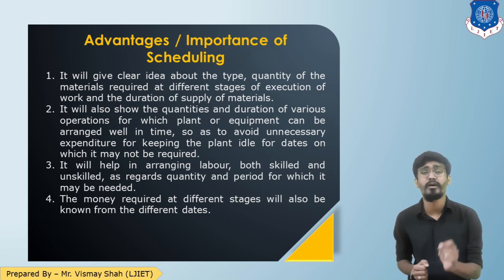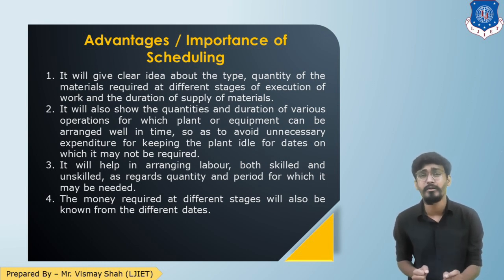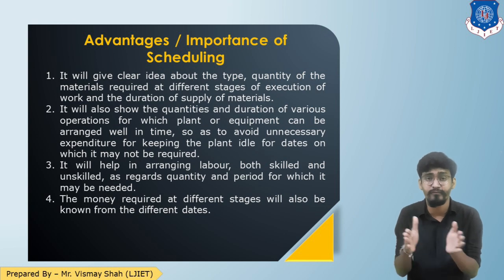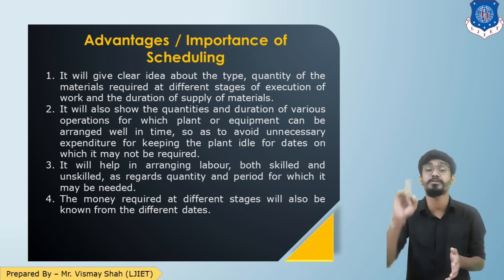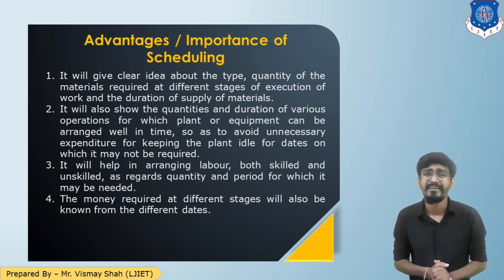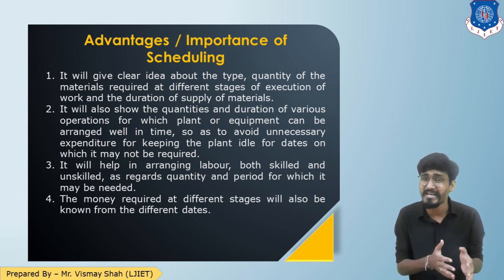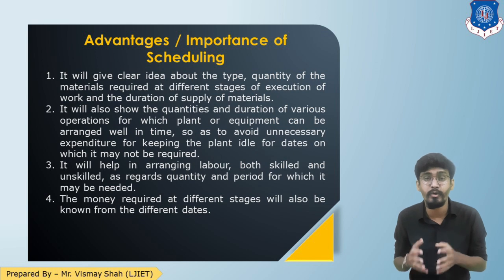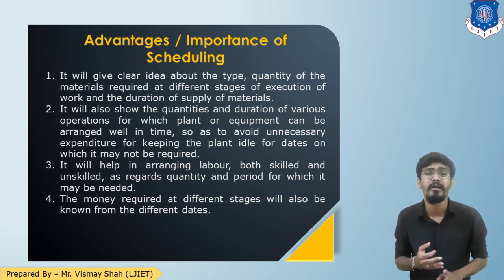Scheduling will give a clear idea about the type and quantity of materials required at different stages of the project. It will also give an idea about the equipment or plant required to perform the activity, so that we can cut unnecessary costs — for example, knowing when we need RMC or concrete only at a specific time. It also helps in arranging skilled and unskilled labor. In summary, scheduling helps us know all four resources — man, money, material, and machinery — in what quantity and at what time of the project.